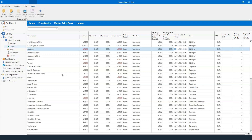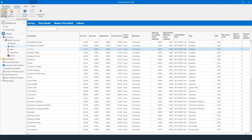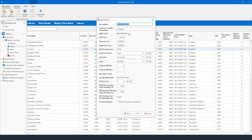One important thing: if you want to create multiple tradesmen — because you might be working with two joiners, two bricklayers, working individually on different projects — all you have to do is highlight their trade. With bricklayer selected, I can go to New Resource and it pulls in that HBXL code. The reason it does that is because when you want to swap out a tradesman, the likelihood is you're not going to swap a bricklayer for a joiner — you'll swap them for someone of the same craft, and that's what the software gives you.